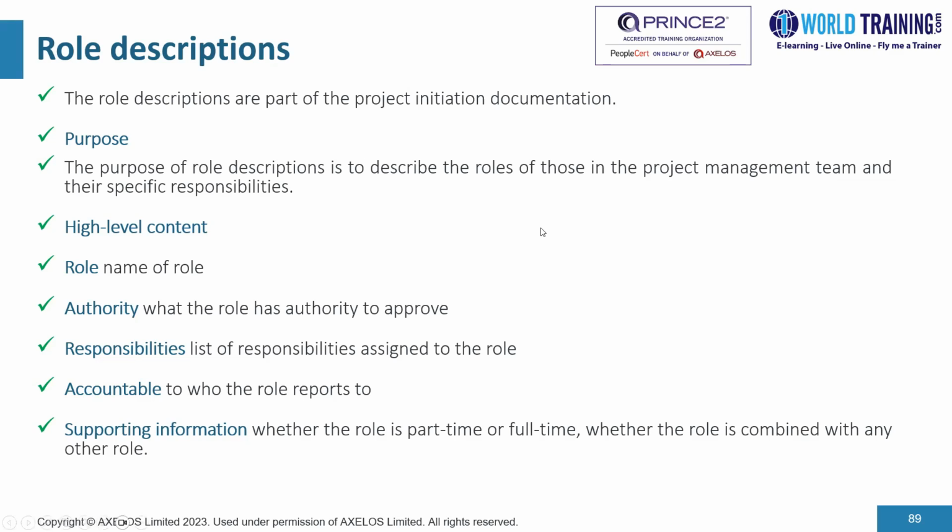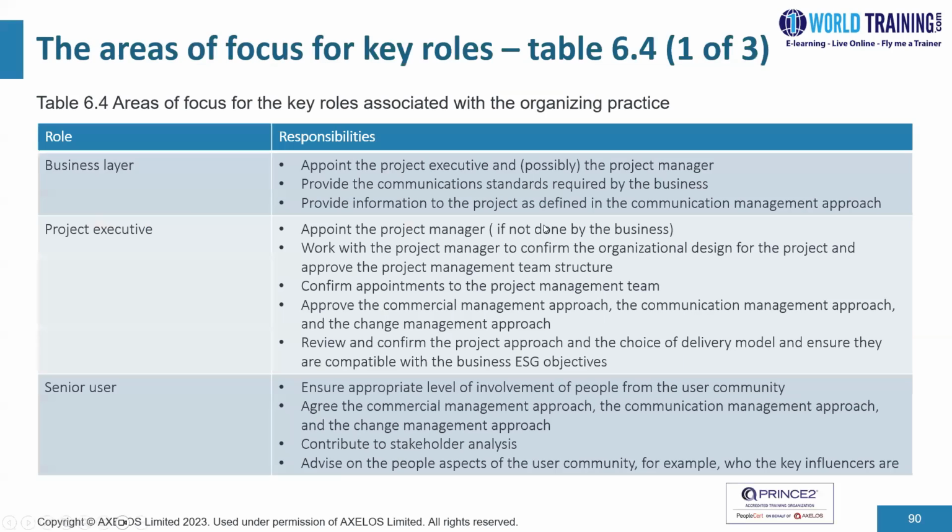Now let's look into the areas of focus for the key roles. In terms of the business layer, the responsibilities would include appointing the executive and possibly the project manager, providing the communication standards required by the business, providing information to the project as defined in the comms management approach.